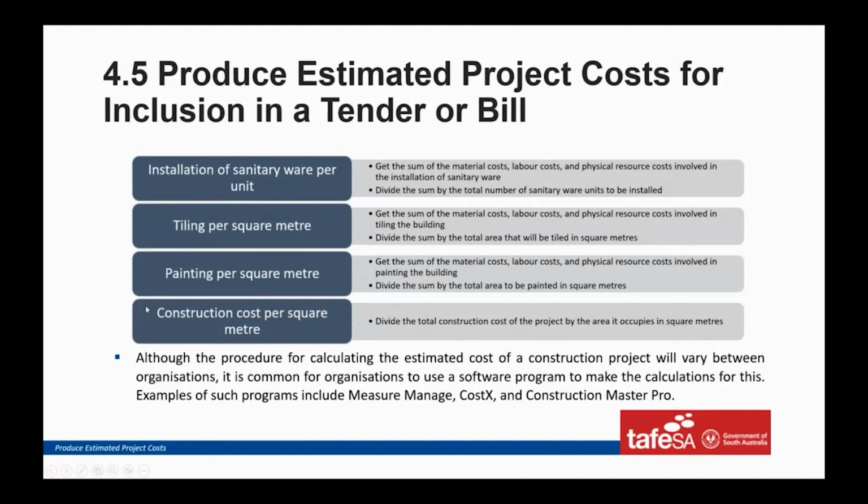Then there's the rate per square meter. So you've got a house that's 160 square meters, and I suggest that if a builder goes for that to do a check price or anything like that, he's going to load this big time so that he's covered. So it wouldn't be this fine, cutting edge, right point of the pencil estimation. It'll be a fair bit of latitude, and this is really important. Construction Master Pro is a great estimating program, but mate, it's longer than paint drying.